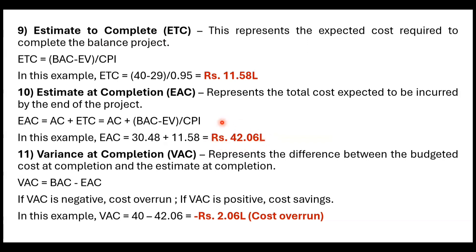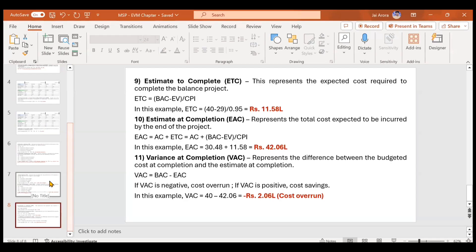Variance at Completion (VAC) = BAC − EAC. The project was budgeted at ₹40 lakh (BAC) but is expected to cost ₹42.06 lakh (EAC). If VAC is negative it indicates a cost overrun; if positive it indicates cost savings. In this example VAC = −₹2.06 lakh, meaning a cost overrun is expected by completion. That concludes the theory section on Earned Value Management.